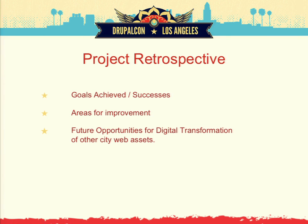Room for improvement. I mean, it was great working with everybody, but of course, not everything is 100% perfect. I mean, we're not in a utopia. But I think one of the things that we learned is that training maybe could have been scheduled at the start with more time allocated for it. I think we scheduled training kind of in between, but we should have started from the get-go. It was a little bit rougher because we didn't know a lot of the terminology earlier. Maybe if we knew it much earlier, we could really understand what everybody was talking about. Even though we're technical, you just won't pick it up right away and understand what everybody's talking about.